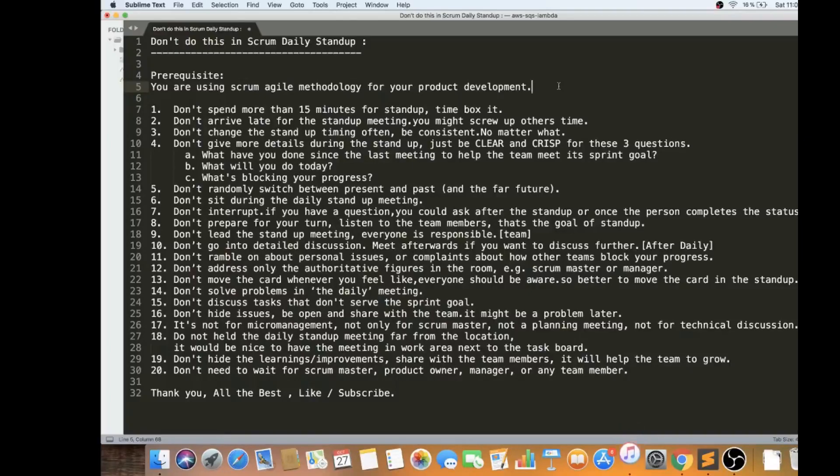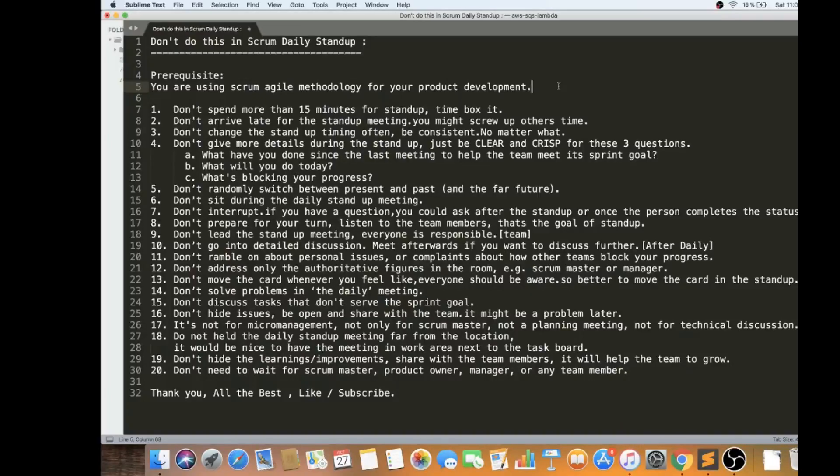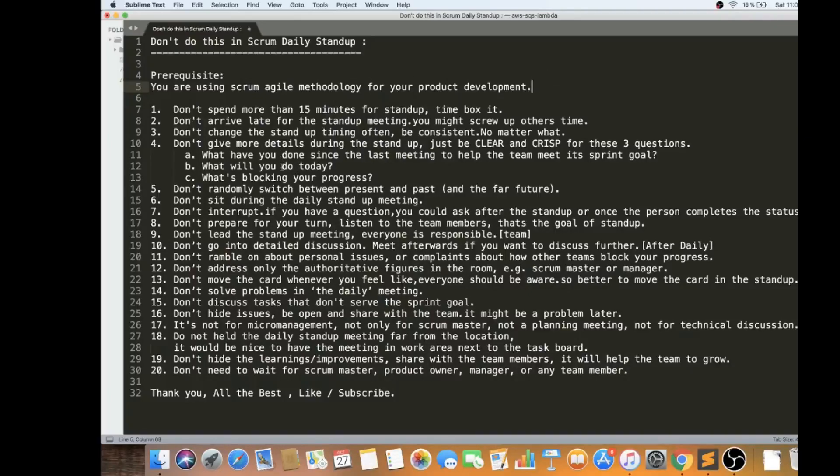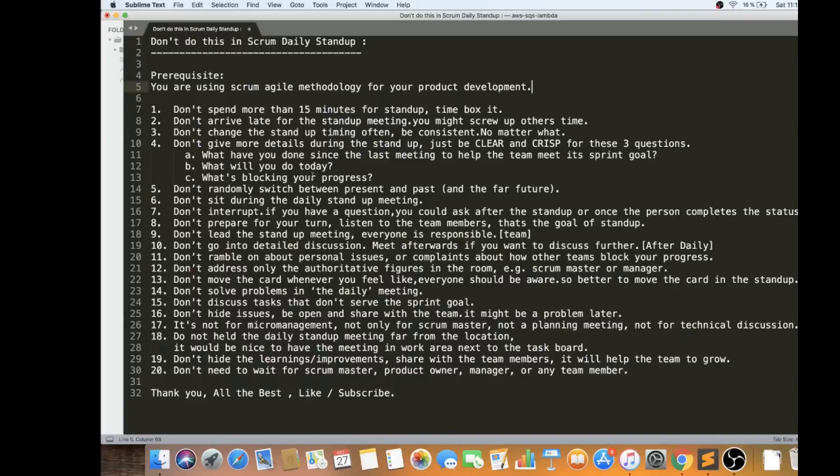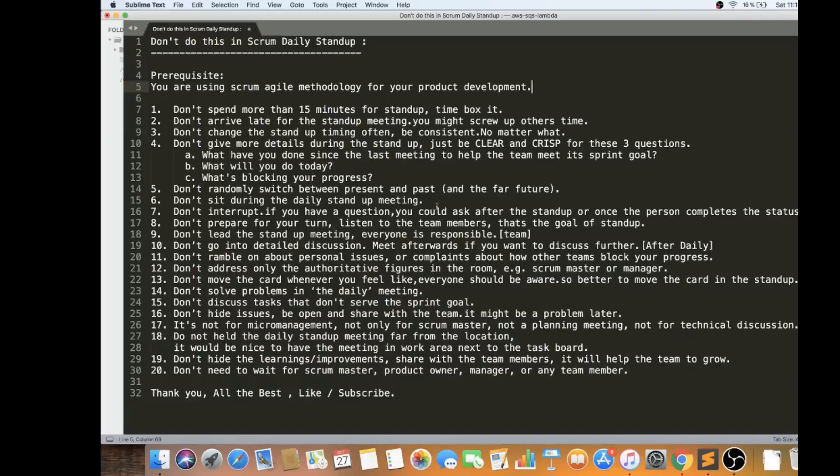Be clear and crisp. I would say don't give more details about these three questions. The fifth point is don't randomly switch between the present and past. For example, don't start with your impediment or blocking. Just be clear with these order. Just start with what you have done yesterday, what is the pending that you will be doing today, and if there is any impediment, you can share with the team. Don't switch between these three.